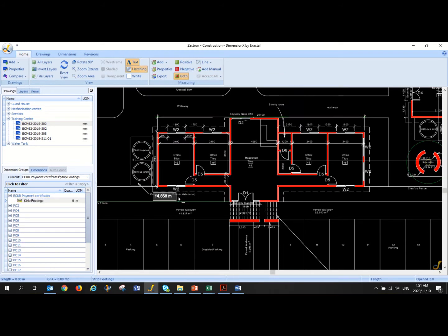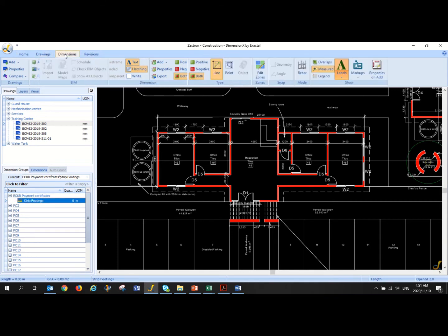Take for instance a simple building layout like we've got here. After month 1 they've done all the trenches, and you need to measure everything that has to be paid to the contractor. So we're busy with earthworks. If we go to our earthworks, we basically measure the amount of work that's done.